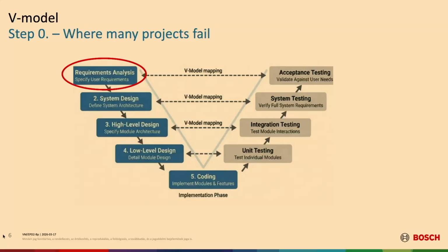It's crucial to have that done, because if we start doing the development and at the end or in the middle new requirements are coming, or we realize that we didn't understand fully those requirements which we received at the beginning, then we need to go back to step 0. And usually it is a strong discussion among the suppliers and the car manufacturers.